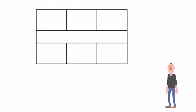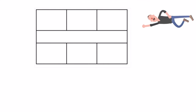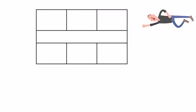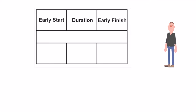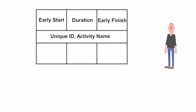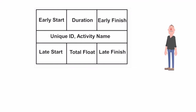Here's how this works. The top row of this box is broken down into three smaller boxes: the early start, the duration, and the early finish. The middle row just represents the activity name and a unique identifier. And the bottom row is broken down into the late start, total float, and late finish.